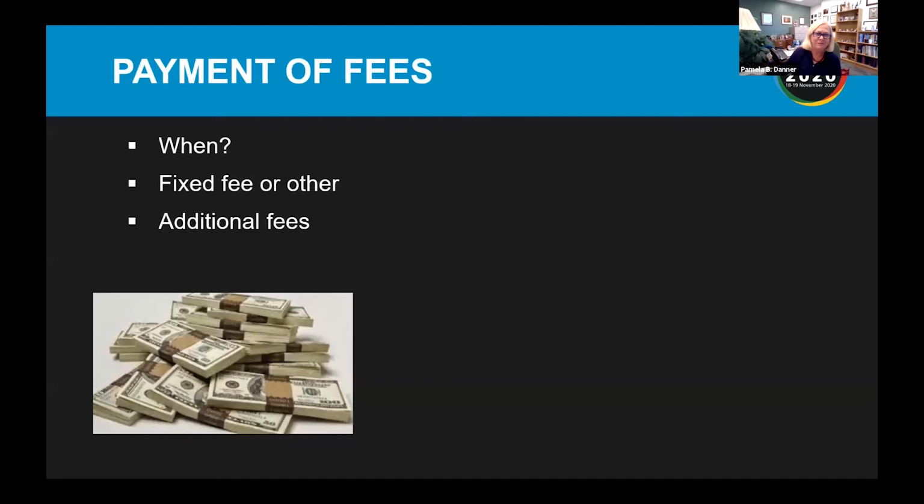This is a critical provision. We all want to be paid for our services. And you typically, as I have seen, provide a fixed fee proposal by which you get a percentage of your fees at each phase. These fees need to be paid. I have seen model agreements, which I agree with, saying within at least 30 days or less. The International Federation of Consulting Engineers model contract says payment shall be made within 28 days of the consultant's invoice.